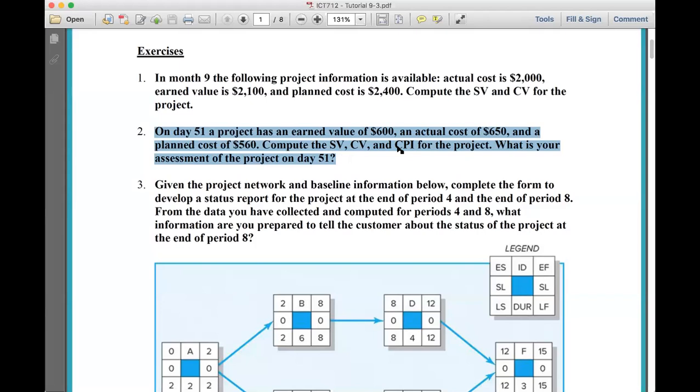So should we define these differently, or can we simply say over budget? They're both telling you that you're over budget, but the way you interpret those calculations is different. When you say cost variance is minus 20, you know straight away it's over budget. And when you say CPI is under 1, it means for every dollar that I'm spending, I'm earning less than $1. So again, I am over budget, because for every dollar I'm spending, I'm earning less work than what I should be earning. Yes, got it, sir. Make sense? Yeah, pretty much.